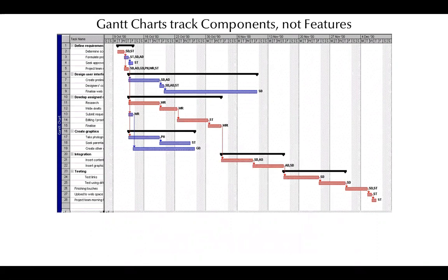There are obviously scaling frameworks where we don't bother to put together Gantt charts, but almost invariably there is someone higher up in the organization who is building one and trying to guess at what the connection is between some kind of agile status reporting and what they really care about, which is these weird finish start dependencies. And the red stuff here is the critical path. If we deliver our components in this way, then we'll be able to be on time and under budget.